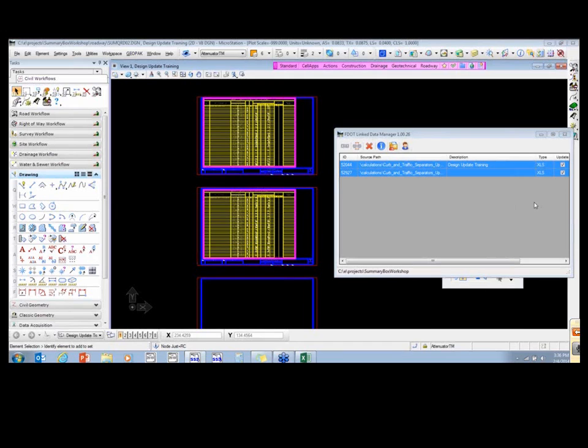Some exceptions would be, and I know there are some districts that are a little stricter on this than others. Basically, if it's a pay item used on the project, you would have a comp book sheet. Your 999 pay item numbers for things like your initial contingency amount, your lump sum project, and another one that's commonly used for the law enforcement officer.